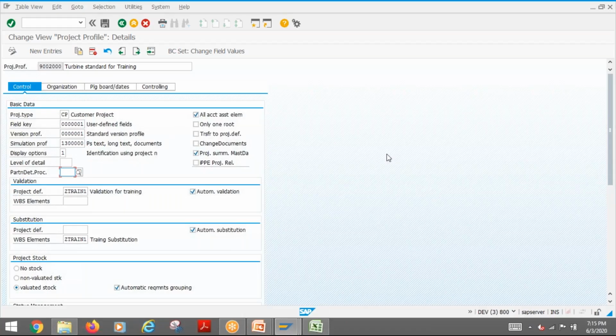Then in the profile you don't restrict it, you allow them to add it multiple times. Then in the same function you can assign again and again and put the people. So I can create one partner function, and whatever the payroll numbers are, I can maintain them in the project. Yes, for example. Anyway, I will show you.